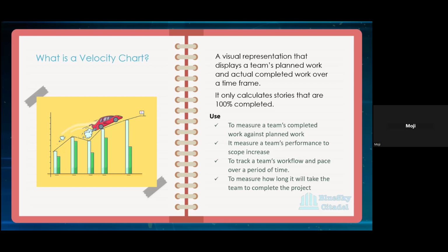Okay, and then we're going into the next sprint and half of the team members are not in. Definitely, you're not going to take 50 story points in because half of the team members are not in. You're not going to take 15 stories in because half of the team members are not in. So you won't say blindly that, oh, but the average velocity says we should take 50, or the average velocity says we should take 15 stories in. You won't say that because you know you don't have the capacity to do 15 going forward.